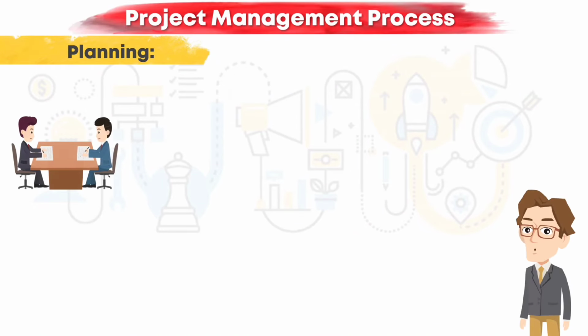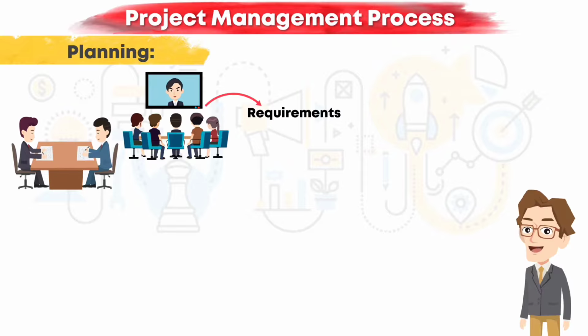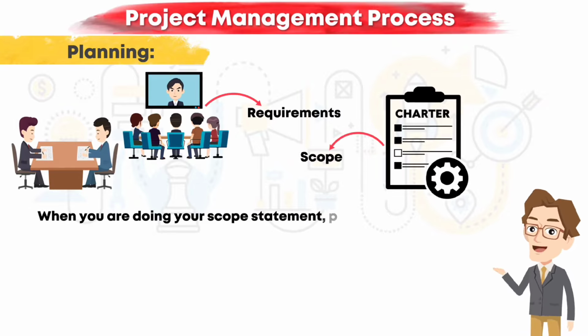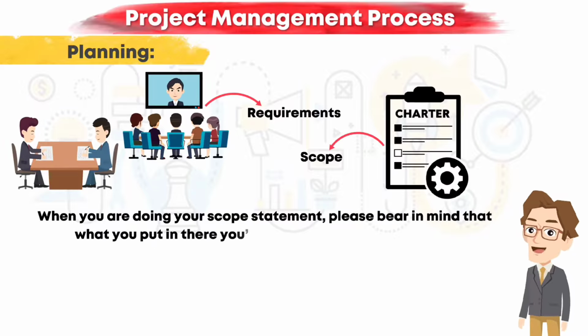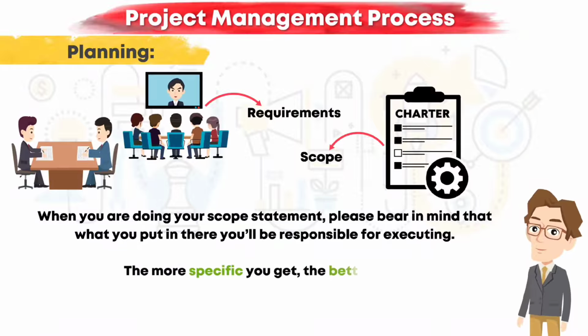You need to set up a one-on-one meeting or a video conference with stakeholders for requirements and for the scope. You can check out the project charter. When you are doing your scope statement, please bear in mind that what you put in there you'll be responsible for executing. So, try not to go overboard. You shouldn't include anything that is open to interpretation. The more specific you get, the better it is.